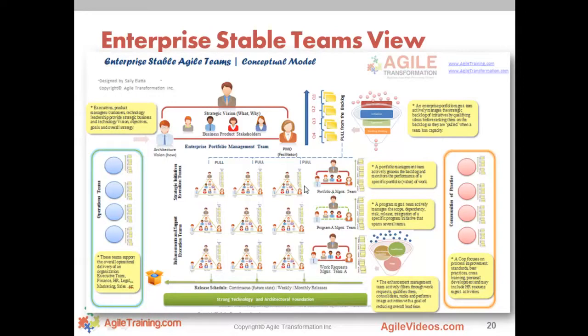There are sometimes some architects that really are shared, that is their role, or sometimes DBAs. They're not really 100% committed to one team. They really are the kind of individuals that do need to be shared between two teams, potentially, maybe three teams maximum, because of the knowledge that they have. But anytime you multitask an individual, you really are spreading them too thin, and it causes lack of focus.